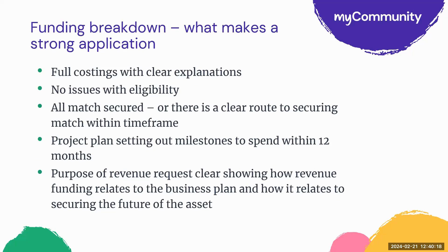What makes a strong funding application? Full costings with clear explanations and no eligibility issues. Go back to any caveats from your EOI and ensure your application is in fact eligible — please ask for advice if you're unsure. In a strong application, all match will be secured or there will be a clear route to securing match within the timeframe. The project plan will set out milestones to spend within 12 months, and the purpose of any revenue funding will be clear, showing how it relates to the business plan and securing the future of the asset.